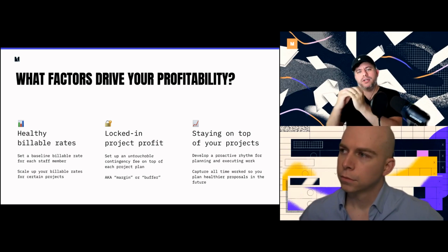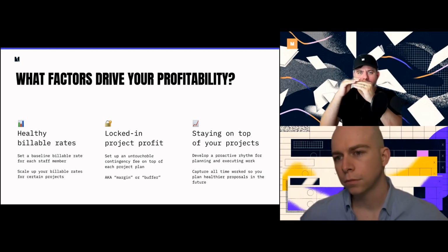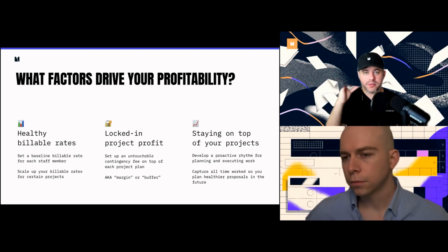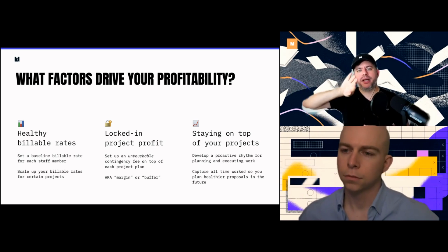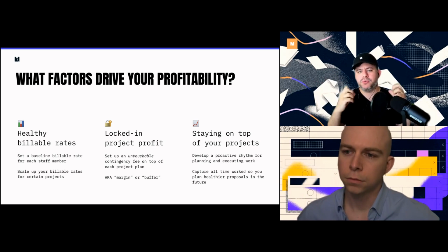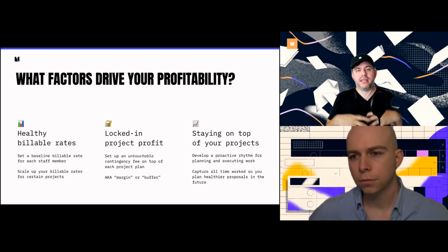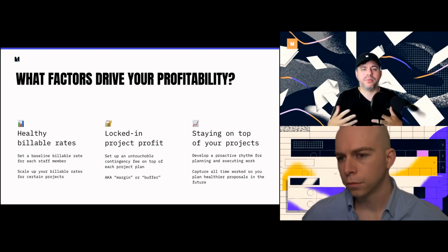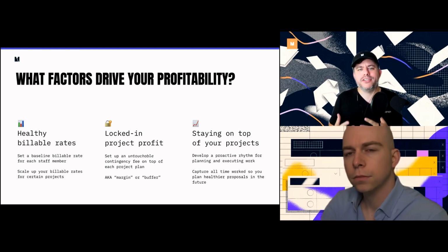We also offer a different lens on that, which is basically to say, if you actually buffer in a very specific number on every project as a percentage, whether that's 5%, 10%, something that you're basically setting aside as a contingency, which is very well known in pro formas for large development projects. They have contingency fees because at the end of the day, you never know. Every plan, the saying is something along the lines of plans are useless, but planning is critical.